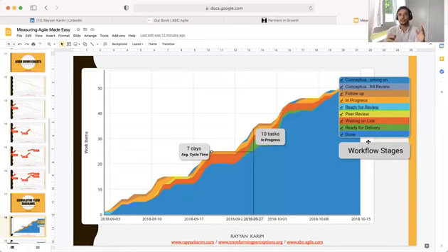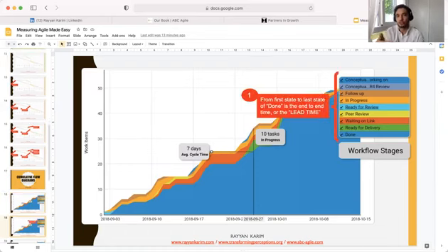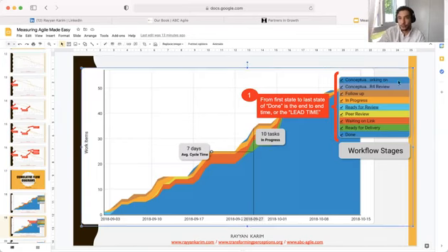They're the steps that you take in order to flow value, because you need to start with a nicely well understood backlog for the good reasons why you have a backlog. Then you go into ready. Once you know that that work item is shaped up, it's going to add value, it follows INVEST principles, and so on, then you can start working on the item when it's the right time to pull it in to the way the team's working. As you do so, that work item itself is flowing through those different states. In this example, these workflow stages show potentially it's starting from this top blue one, conceptual working on, all the way down to done.